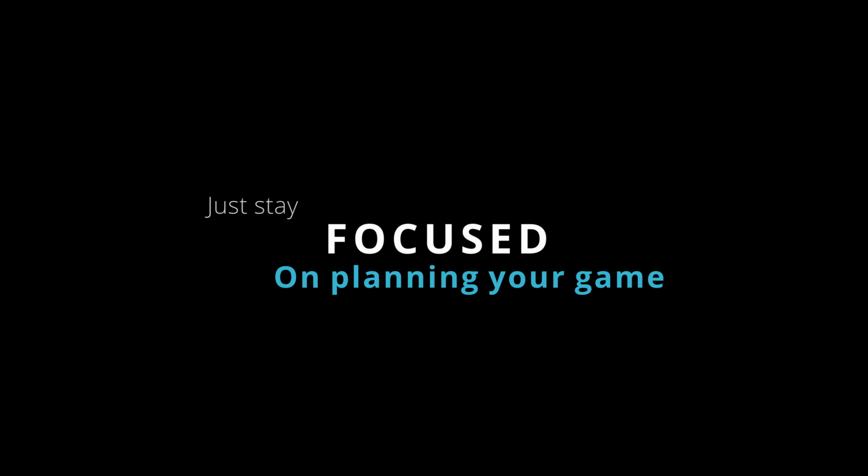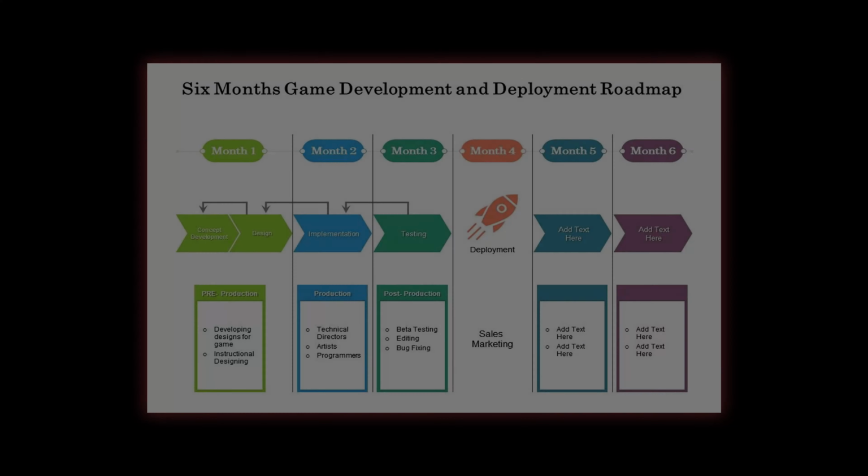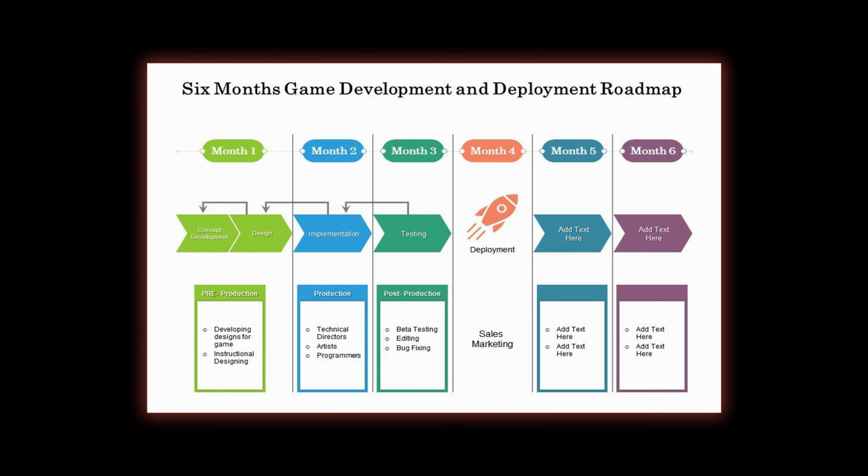Now, some may think that I'm putting too much emphasis on the timeline, but having a good sense of how long this project is going to take you is critical for any game dev. Maybe after planning the game you realize that your little indie idea is going to take 3 years, and that adds perspective. Maybe you feel very strong about its potential and you're good with that plan, but maybe you choose to reimagine your features in a way that it fits into a timeline that you are more willing to accept.